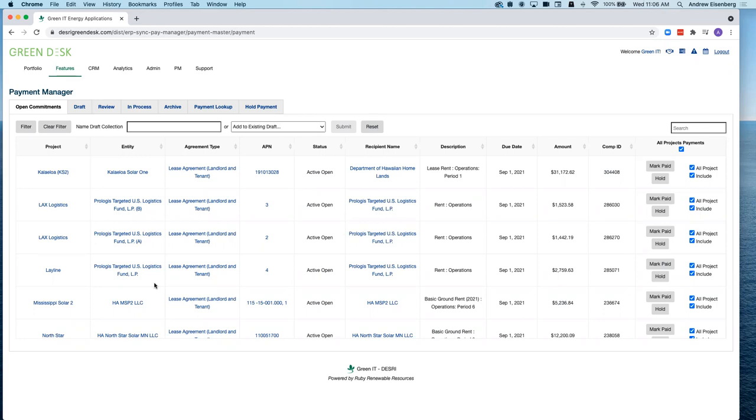There's more to it, of course, because the payments might be operations payments. So for a Ranger development project, the operations terms payments don't get calculated until we hit certain milestones. So those are two dependencies. The first being I need an executed agreement, and then I need to have triggered my appropriate milestones.